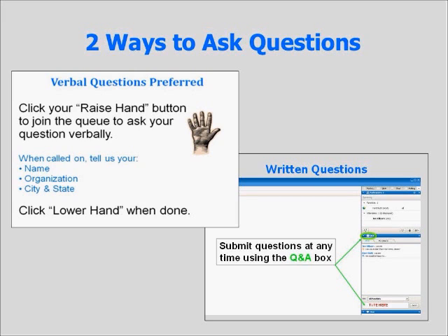Well, I think you're going about it the right way, and what I would do is to look at your other work that you've done in the last few months and see if it's coming in kind of in line with that. It sounds like you feel it is. As long as you don't see another place where they have stuck administrative or profit kind of fee, then it's perfectly fine to pay them. We want these people to make money. We just don't want them to make too much. But it's a legitimate expense as long as it's not duplicated someplace. But that was my main concern.